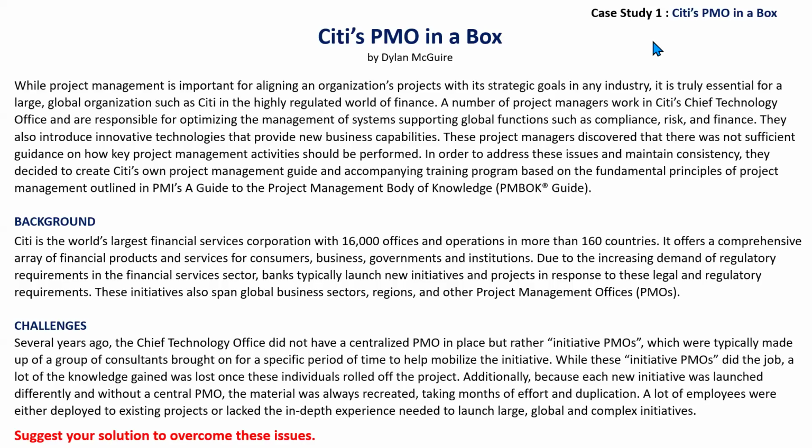Then, the maximum use of the same consultants. In this case, we see the knowledge and experience that they are gaining is lost, because you bring in a consultant and they work for a specific period, and then they move off. When it comes to similar projects in future, they will perhaps not be available. Instead, some other consultant will come in. That will affect the maintaining of the experience and the gaining of knowledge, which could be utilized in the future. So as much as possible, maximum use of the same consultants is a requirement.